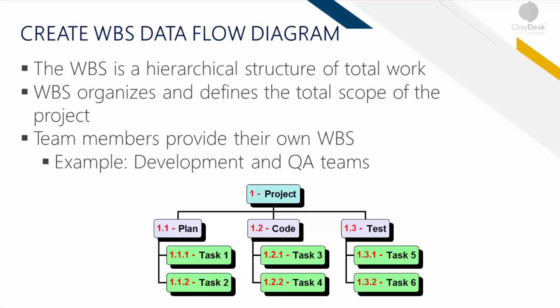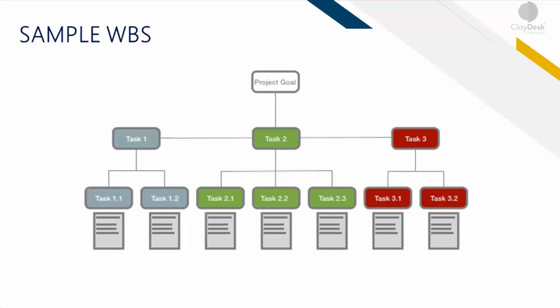The work breakdown structure is simply the process of subdividing project deliverables. Here's a simple WBS data flow diagram — it is a hierarchical decomposition of the total scope of work to be carried out by the project team to accomplish objectives and create required deliverables. Here's a sample WBS: you have the value management system project on top, divided into needs assessment, standards development, and so on. The needs assessment has further sub-tasks, with labels going from 1 to 1.1 and then 1.1.1 and so forth.